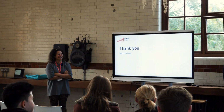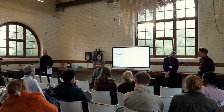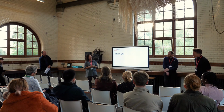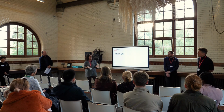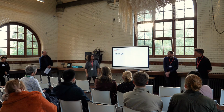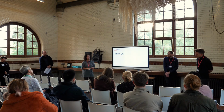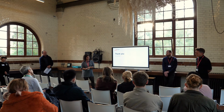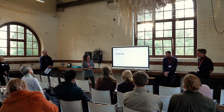Quite a big subject. Do you know how much it costs the landlord to retrofit the property? Well, we have a cost for what the project cost, but in terms of what the landlord would pay, it will be quite different because we did the whole thing. And if a landlord wanted to do that, it'd be a big undertaking. But I think the project budget for the show home, and bear in mind it was a show home, it's not for every home, was £112,000 with funding. Half of it was funded by ECO funding, and I think it was Salix funding.